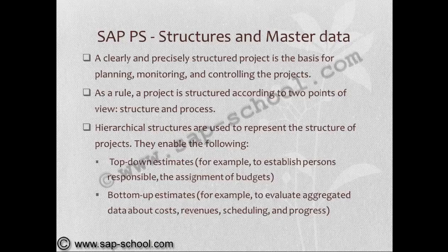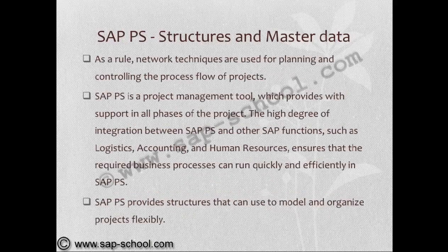Hierarchical structures are used to represent the structure of projects. They enable the following: top-down estimates, for example, to establish persons responsible and the assignment of budgets; and bottom-up estimates, for example, to evaluate aggregated data about costs, revenues, scheduling, and progress. As a rule, network techniques are used for planning and controlling the process flow of projects.